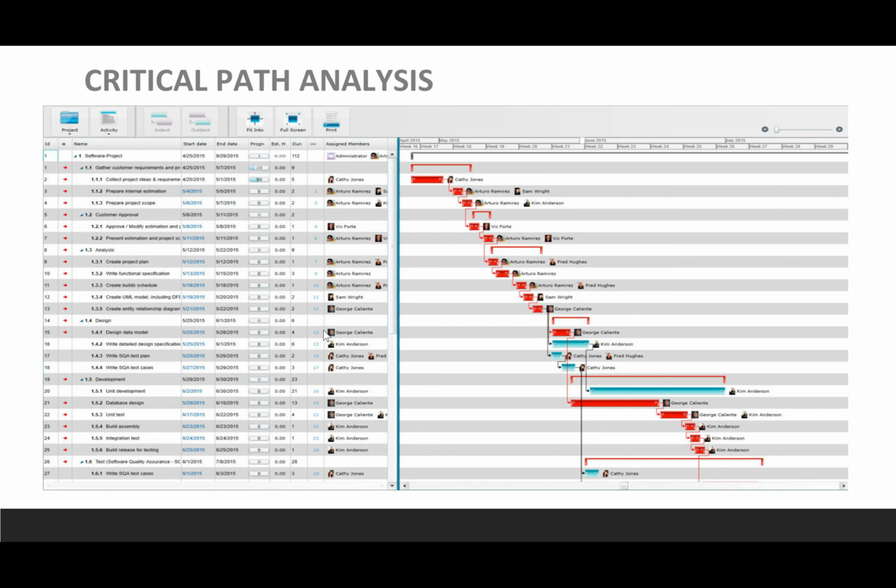Okay, so if you have development on your critical path, right now you may have one developer working on that. If it makes sense, add 2 additional developers, kind of like what we're doing, we're standing up an additional Scrum team just to work on the coding for that mandate. So that's what we're doing. We're going to crash our schedule to bring in our critical path by 4 weeks.